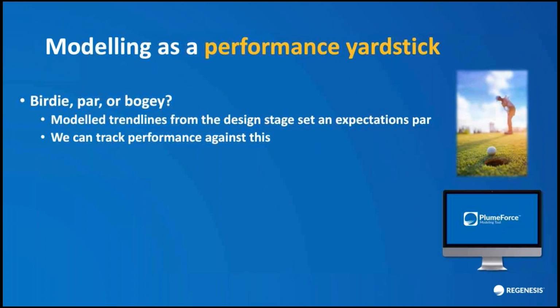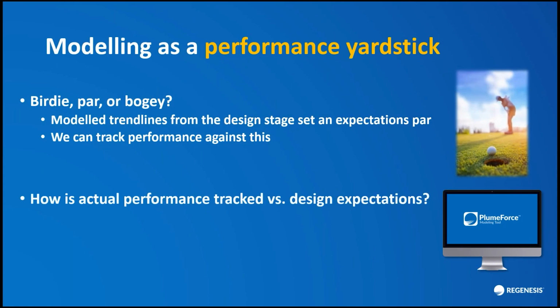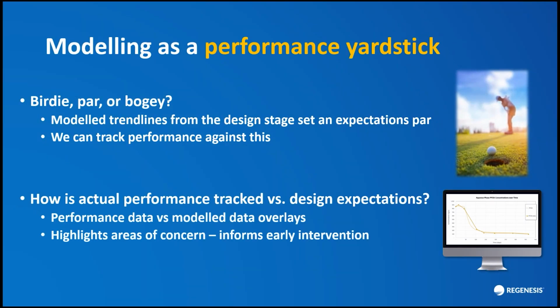And this gives us a measure of what good performance looks like. We can then compare actual site data to this as the monitoring results come in to see how we're doing. And the PlumeForce modeling software simplifies this by allowing us to overlay measured data on the model data outputs to quickly expose any discrepancies.